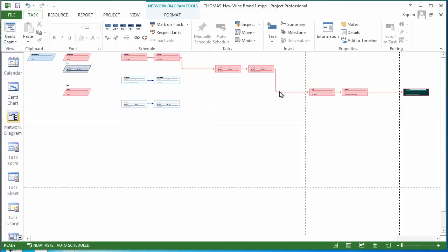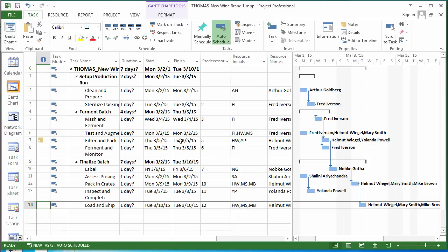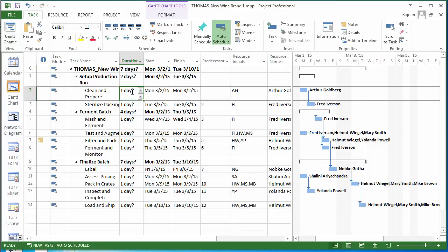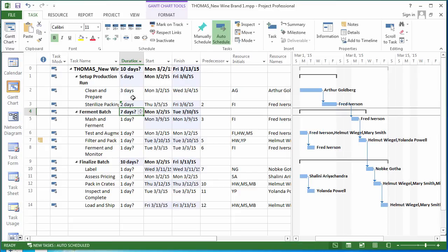We haven't actually entered the durations yet for the tasks, so we need to go ahead and do that. Once we do that, it's going to change how this project looks, and it's going to be much more realistic. One thing I want to be sure you pay attention to is you don't set durations on the summary tasks. These, the ones that are bolded, never enter information directly into the summary tasks for duration. Those will automatically update as we enter other duration information.